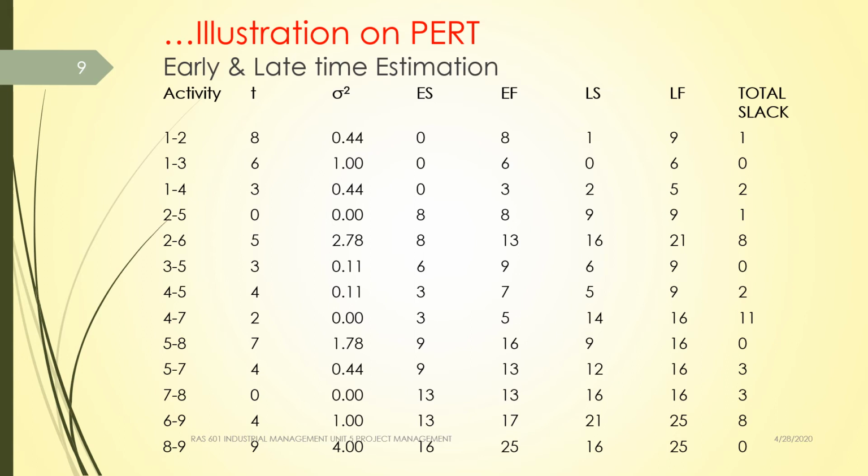The time taken between the two nodes is the same as the EST. It stands for earliest start time, and if there is no predecessor activity, then it will be 0. To calculate the earliest start time for the successor activity, we just add the time taken to complete the activity to the time taken by the preceding activity.